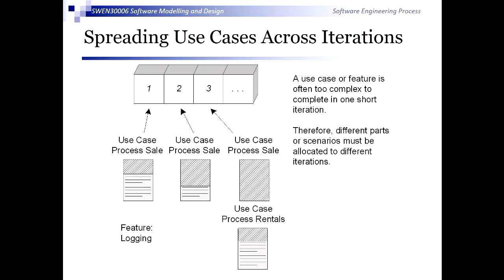Iterations in Agile are time-boxed, so you might be working 3 to 6 weeks for an iteration, and that's a rigid time frame. You don't choose a set of requirements and work until they're done. You choose a period, you select the scope for that period, time-boxed period, 3 weeks, 6 weeks, whatever it is. You choose work that will fit in that, and if you find you can't fit the work into that period, you scope the work down. You don't extend the period. That's a key feature.